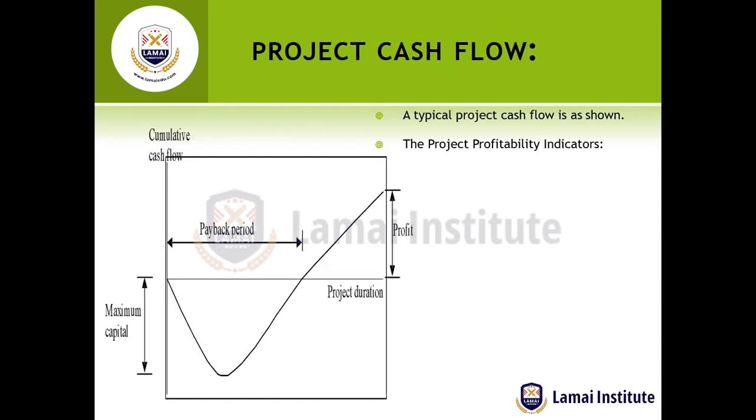That is basically the period that we use to pay back the project, or when the cash flows equal the initial investment of the project. And that's what we call the payback period.